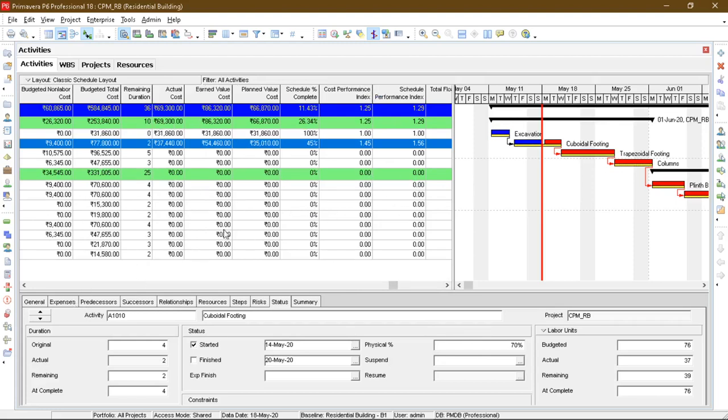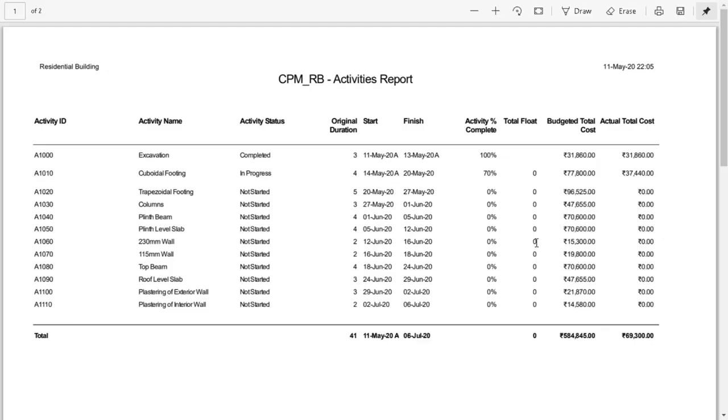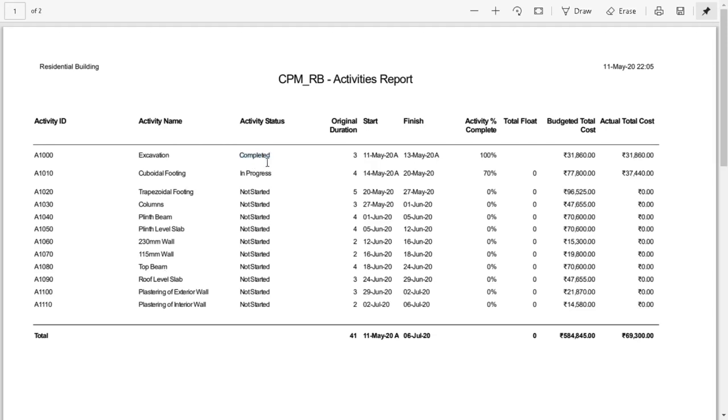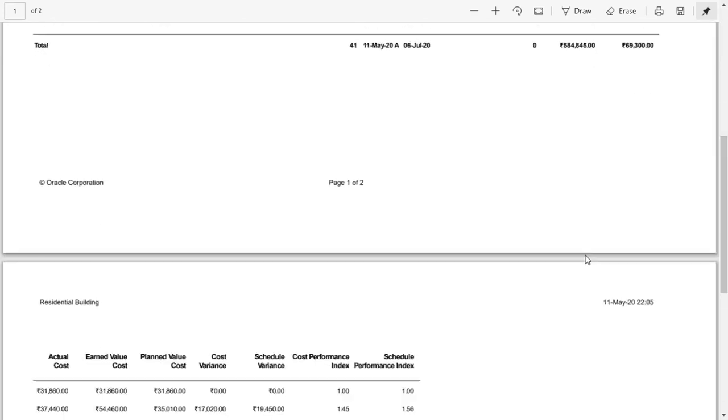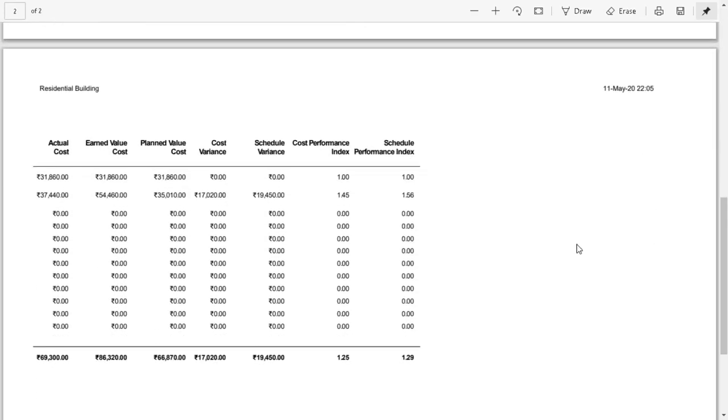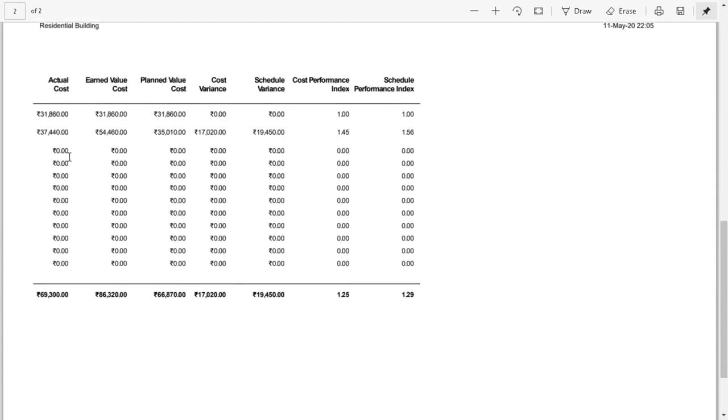And that's it. So as you can see, this is the project report I have generated using the project result option in the Primavera P6. As you can see, I have chosen these many options for columns: activity ID, activity name and so on. So as you can see, this was my completed project and this is my in-progress project. And these are some of the columns which I have used for the project report.